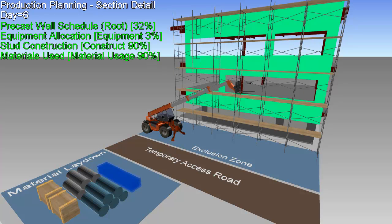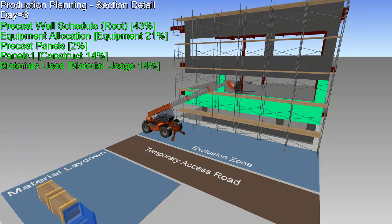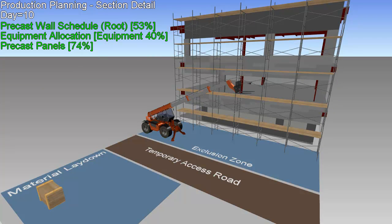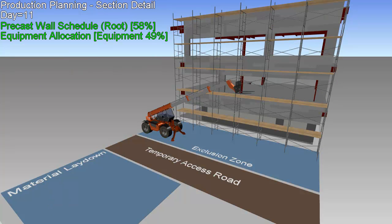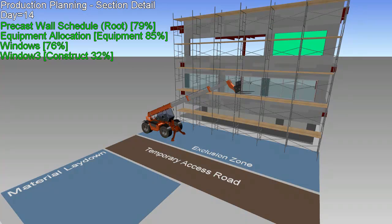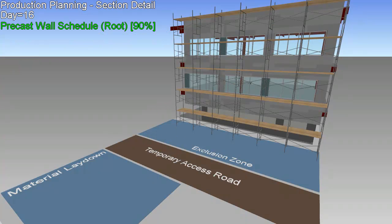Here we see a visualization of how the curtain wall panels and windows will be installed, including locations for the heavy equipment, staging areas for the materials, and safety considerations. By running through the scenarios virtually, the logistics of the activities can be worked out ahead of time.